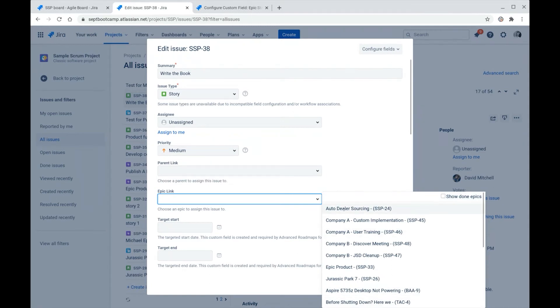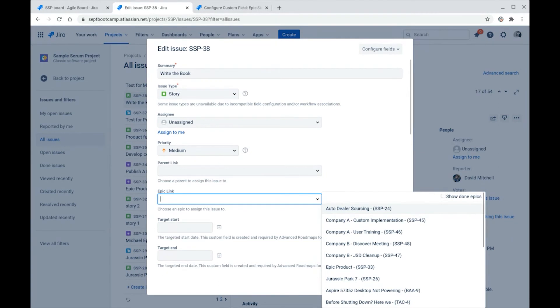So we see Jira is clearly keying off of the epic status field to decide if an epic is still active and worth showing as options in either of these two places. And this is actually really nice so that all the closed epics don't appear anymore. So given this important behavior, we highly recommend that the epic status be changed to done when the epic is closed.